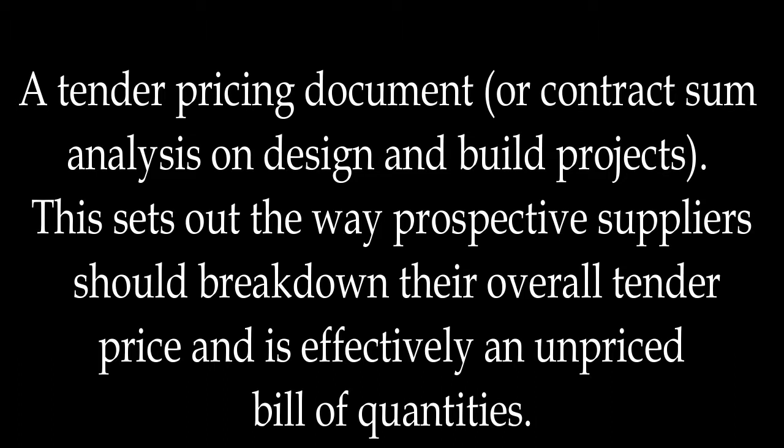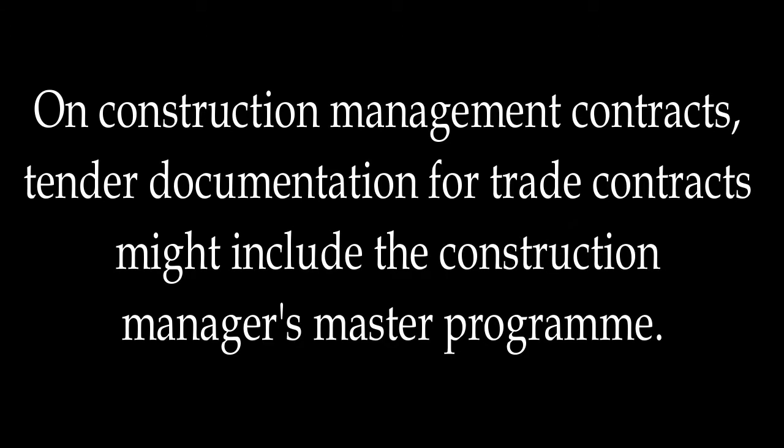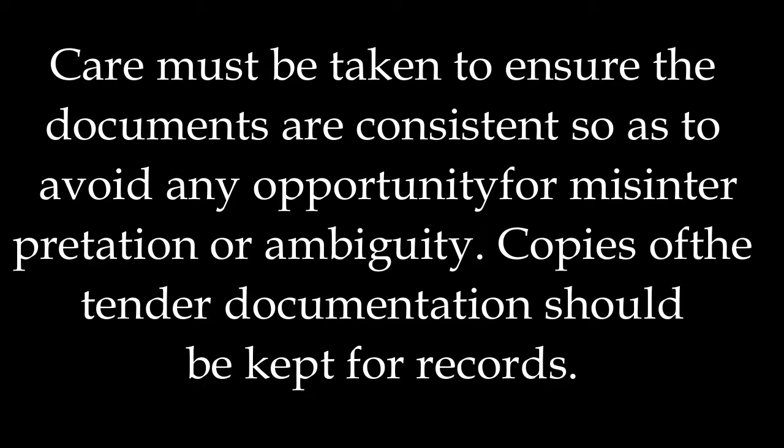This sets out the way prospective suppliers should break down their overall tender price and is effectively an unpriced bill of quantities. On construction management contracts, tender documentation for trade contracts might include the construction manager's master program. Care must be taken to ensure the documents are consistent so as to avoid any opportunity for misinterpretation or ambiguity. Copies of the tender documentation should be kept for records.